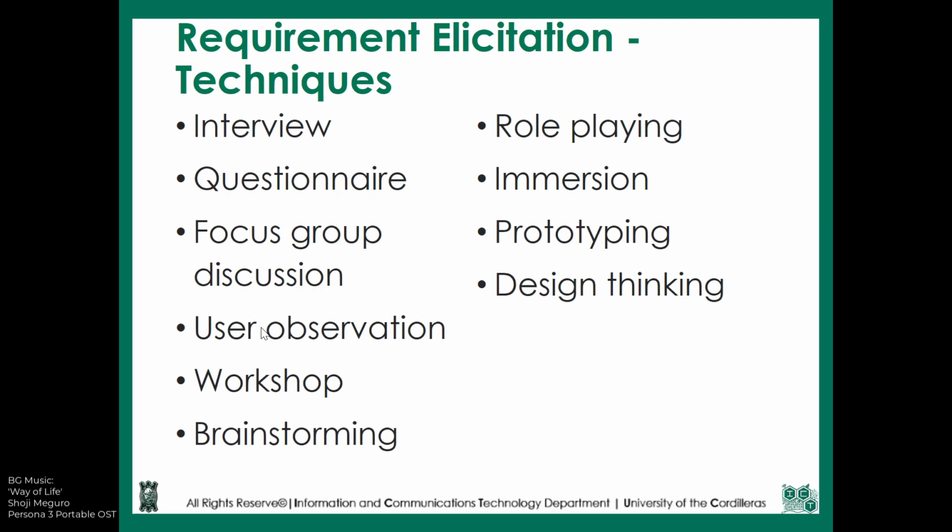So when you're doing requirement elicitation, there are a lot of techniques. The very common one is of course doing an interview with your client, but we have other ways, like a questionnaire, focus group discussion, or observing the system. This is much better if you're actually within that system, and it's also the reason why we chose UCSHS, so you won't have to be foreign to all of the processes that we have.